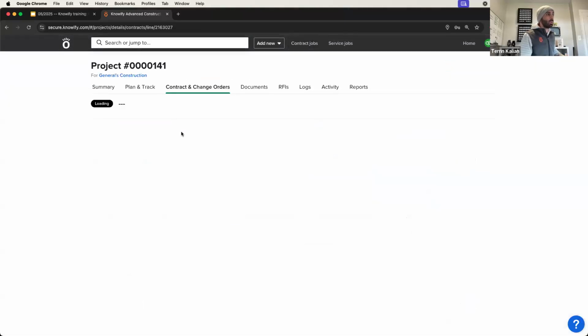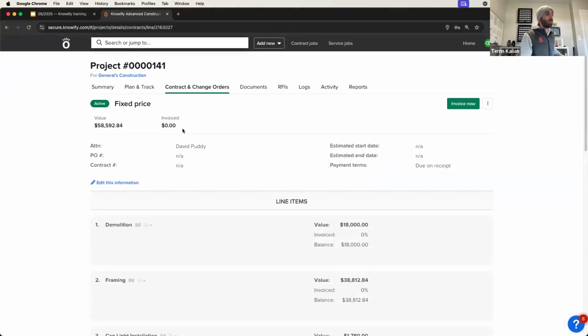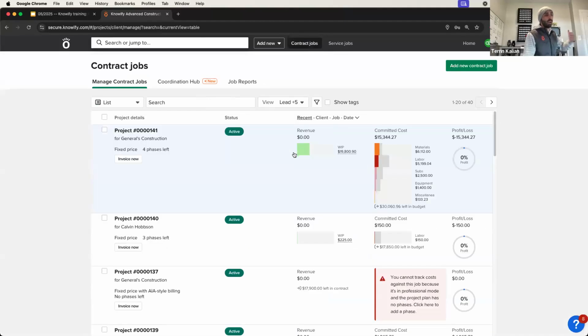Although your revenue, your markup, should include the amount that you'll end up spending in overhead, it shouldn't be something that you're budgeting for, because then you're somewhat charging for it twice. The resulting profit of the job, after the markup on your contract, should be enough to cover the overhead as well.